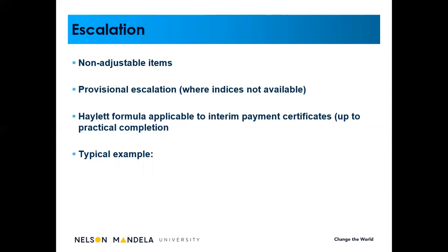And then attendance. Attendance is the contractor providing services to the electrical nominated subcontractor, because the electrical nominated subcontractor is using perhaps the scaffolding of the contractor, or the electricity on the site, and the contractor is paying for that. Therefore, to cover those costs, the contractor will insert an amount for attendance. In other words, he provides a service to the nominated subcontractor. So overall the profit and attendance belongs to the main contractor, and that is a non-adjustable item.